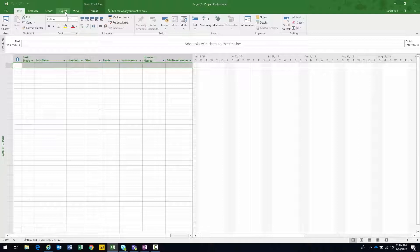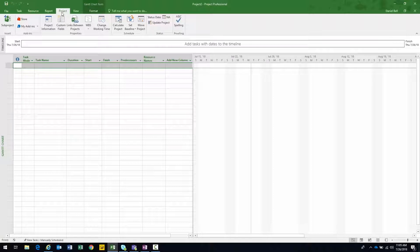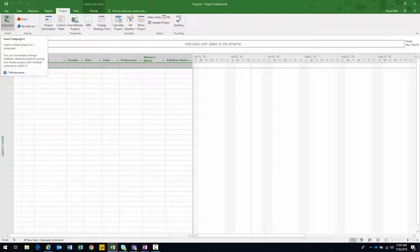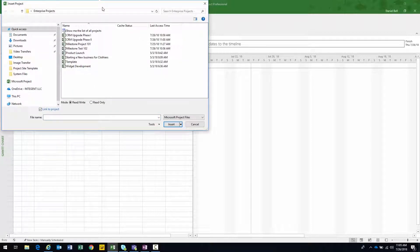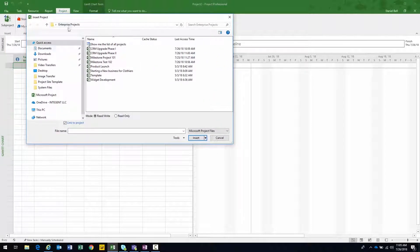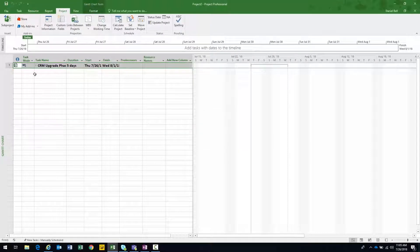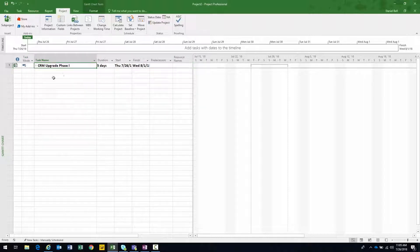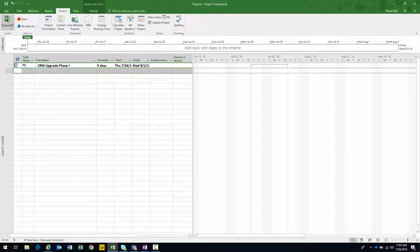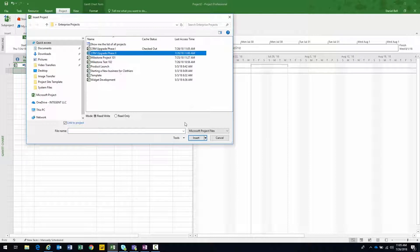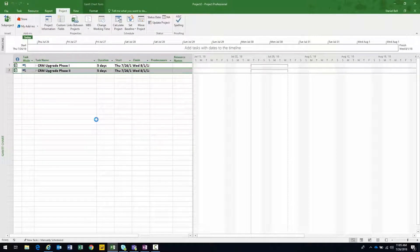With the blank project open, what I want to do is insert the two projects that I want to create dependencies between. I navigate to my project ribbon and notice all the way to the left there's a sub-project button. Go ahead and click on that. It brings up the normal open project dialogue. There's my CRM upgrade phase one — I'm going to click on that, select it, and then click the insert button. That inserts my project right in there. Let's go ahead and put phase two right under that by clicking sub-project again and selecting phase two.